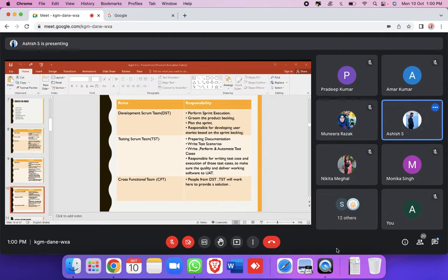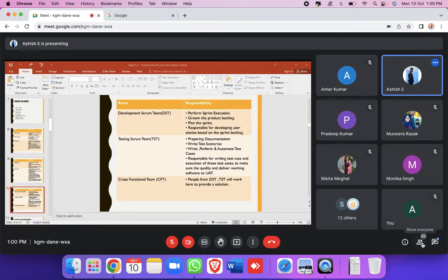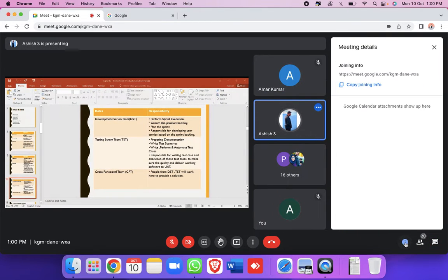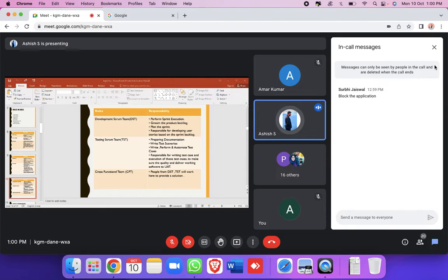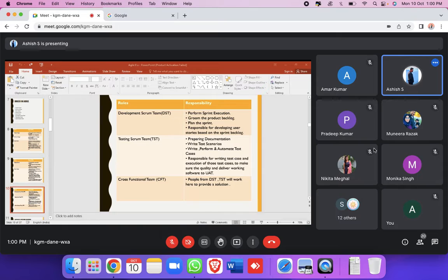It might not be blocking the application, but it might be a critical or it might be a blocker. So if it is affecting the business flow, what will happen? We have to give one fix over there. That fix should be given within 24 hours of that particular bug being found. At that time a group of test engineers and developers will sit together in a room called a war room and start working on that particular application. This is a high level definition of a hotfix. Understood?